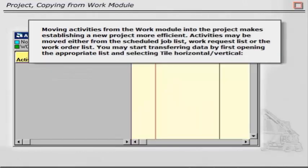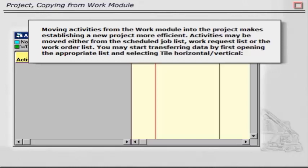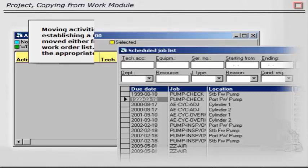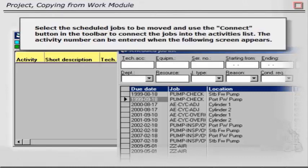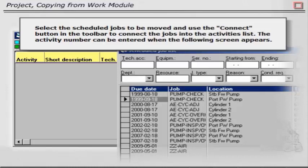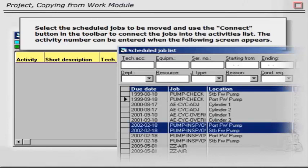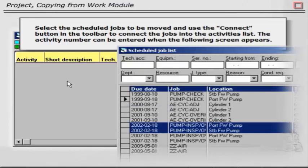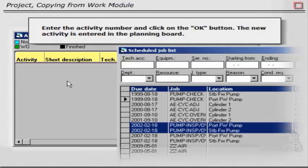Moving activities from the work module into the project makes establishing a new project more efficient. Activities may be moved either from the Scheduled Job list, Work Request list, or the Work Order list. You may start transferring data by first opening the appropriate list and selecting Tile Horizontal Vertical. Select the scheduled jobs to be moved and use the Connect button in the toolbar to connect the jobs into the activities list. The activity number can be entered when the following screen appears. Enter the activity number and click on the OK button. The new activities entered in the Planning Board.